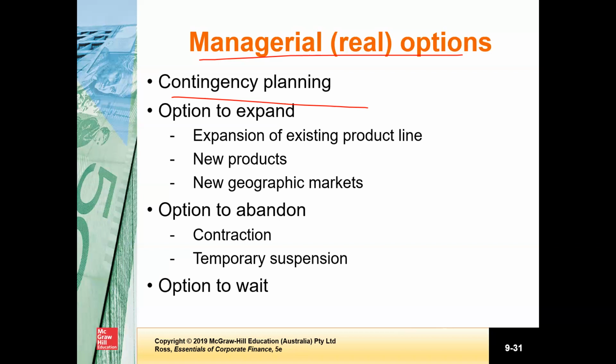What we think about in this case are some of the possible futures that could come about and what actions we might take if they do. For example, we might find that a project fails to break even when sales drop below 10,000 units. This is a fact that is interesting to know, but the more important thing is to go on to ask, what actions are we going to take if this actually happens?